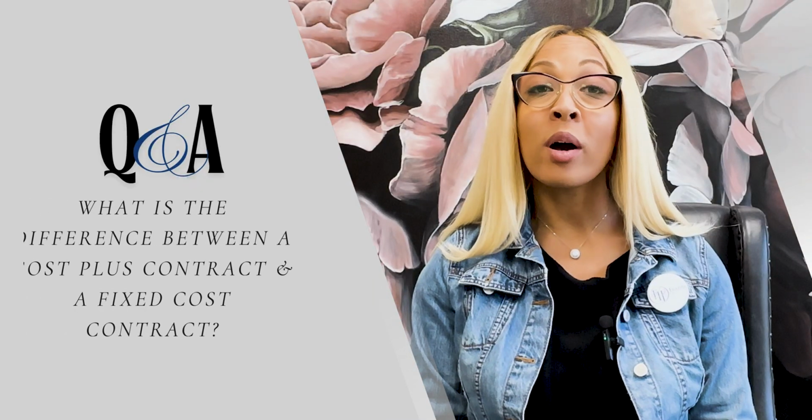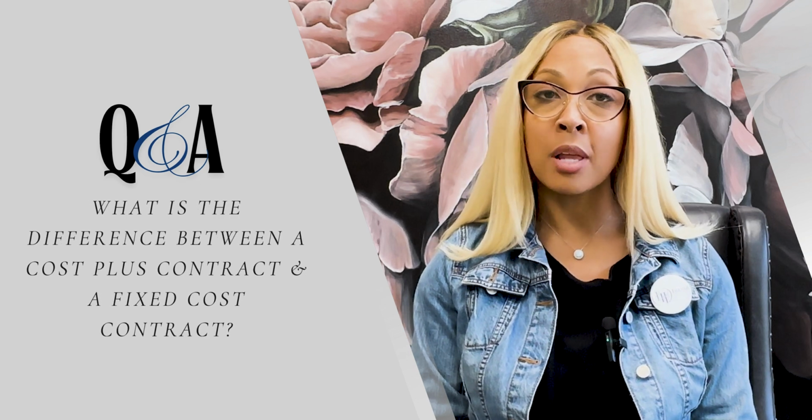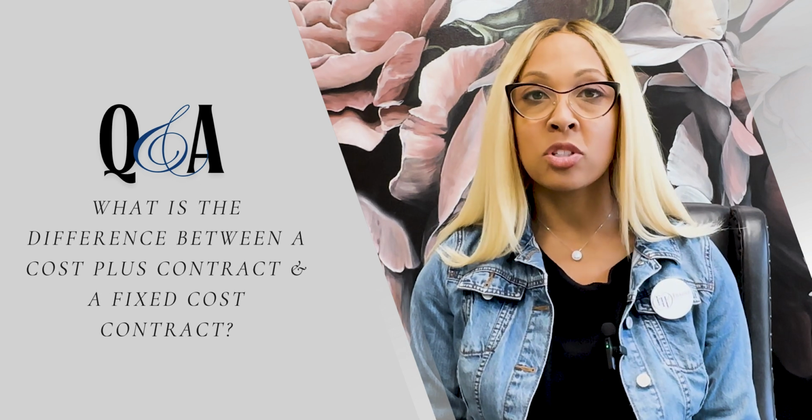So the question is, what is the difference between a cost plus contract and a fixed cost contract? So let's start with cost plus. A cost plus contract is where you have a very trusting, open relationship with your builder, and the builder is going to charge you for the cost of the particular commodity, the material, or labor, whatever their cost is, plus a fixed fee or established rate.